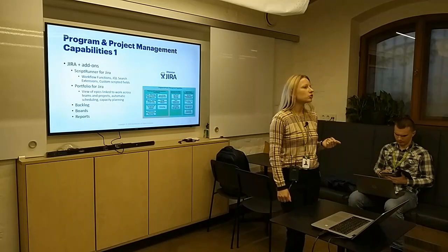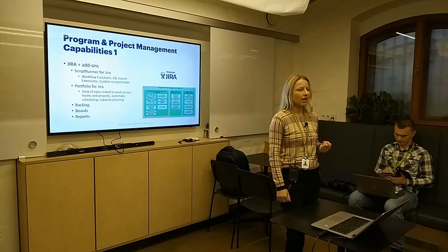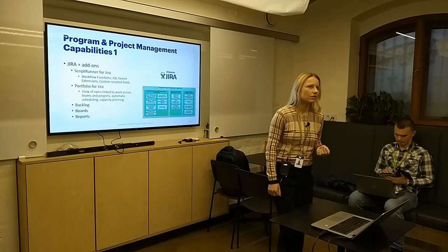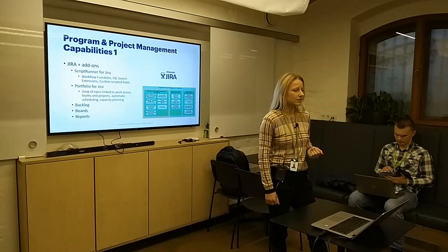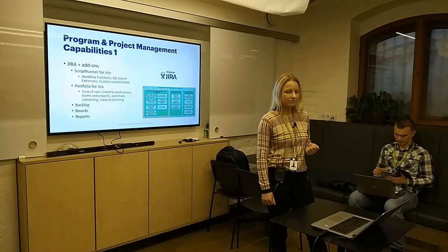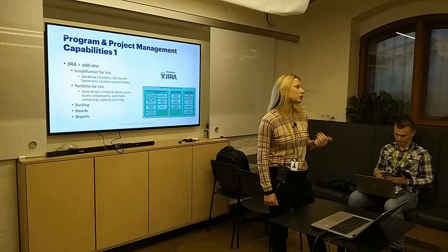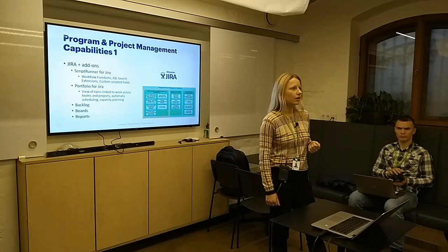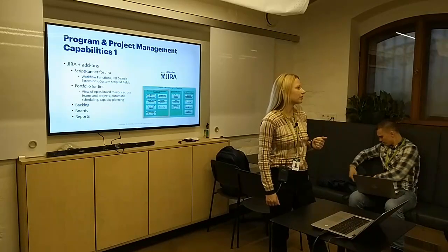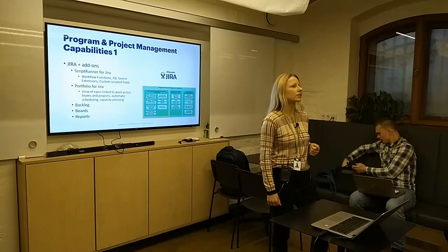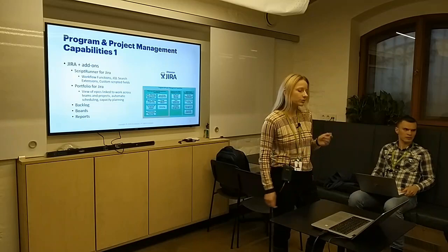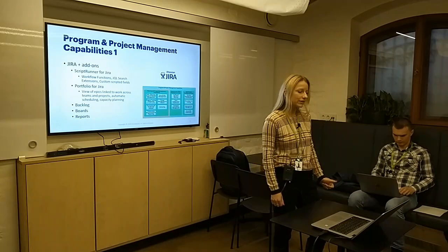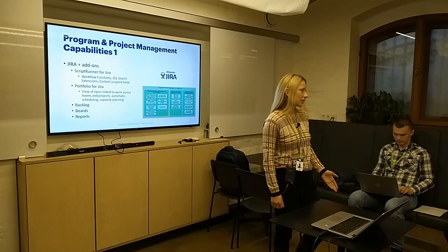In each team there is a Scrum Master, and during the sprint, Scrum Masters meet together in a Scrum of Scrums, where we discuss what happens in the teams: blockers, and issues which can depend on another team's issues. This is solved during the Scrum of Scrums. That is why it's very important for us to enable program and project management capabilities.